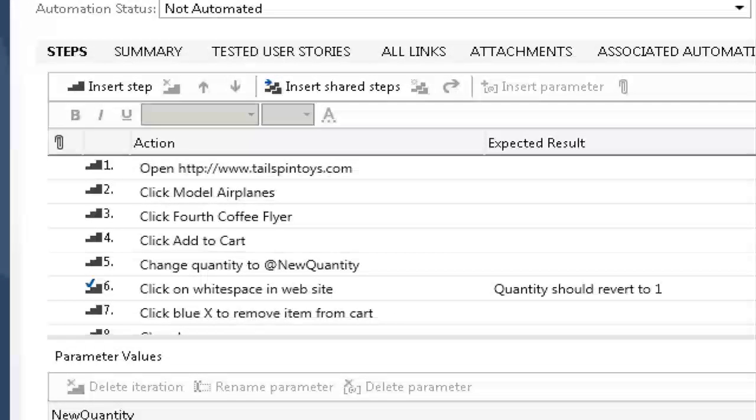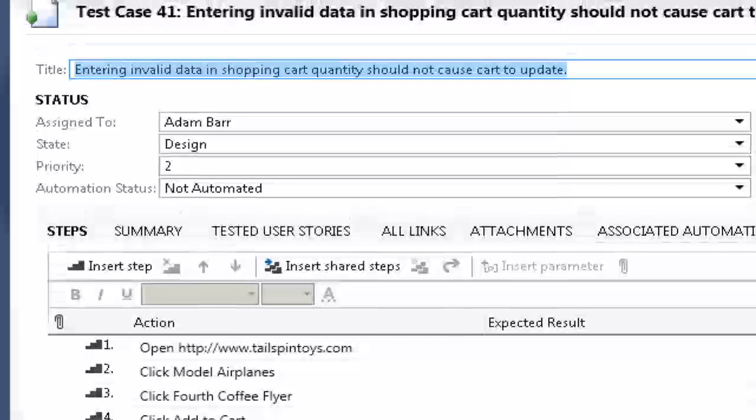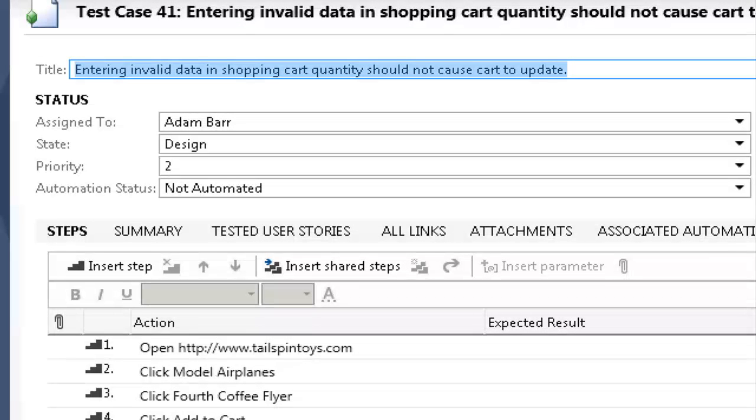For those of you that are already using Team Foundation Server, this is just a work item. So a test case is a work item, and that's very much by design. Because Team Foundation Server takes this concept that says the more data we get into the system, the smarter we can be about giving you information to build better software. And so your test cases get linked back to your requirements. Your requirements can then be linked back to builds. So you can say, for example, that this requirement was implemented in that build, and these 5 test cases validate that requirement, and 3 of them are failing. So that's the type of information we want to give back to you as a team so you can make smarter decisions.